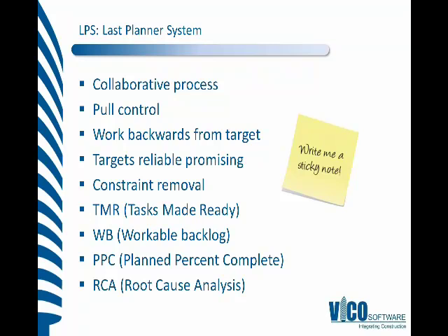That deviation, the cause of deviation, then has to be analyzed. And the process of root cause analysis is really asking those 5 whys. Why did something go wrong? Why did that cause that to go wrong? What is the chain of reasons or the process that caused the deviation from what we had planned the previous week?